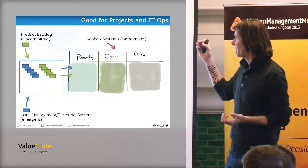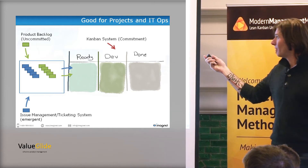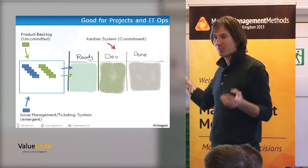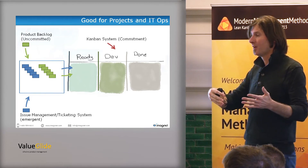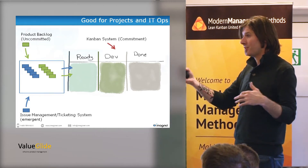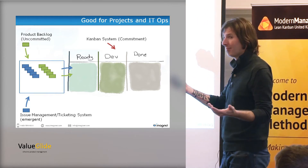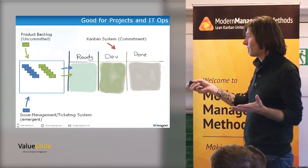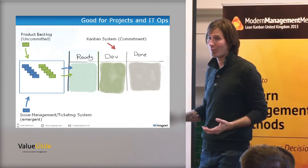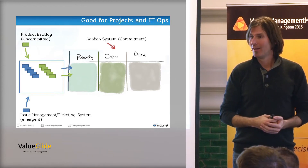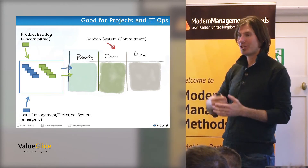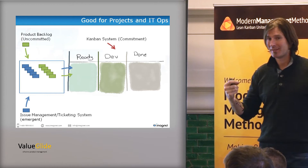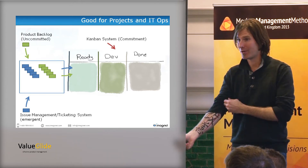Here's a really simple Kanban system: I'm doing something, I'm done. Here's a product backlog — uncommitted work, not in the Kanban system, just a big pile of good stuff. It's going to be prioritized. I just need to, once every two weeks, replenish my ready queue. It flows through to done. It works really well for issue management or ticket management where we have a lot of emergent work — it goes into the same backlog, gets prioritized amongst project work, and flows through the system.